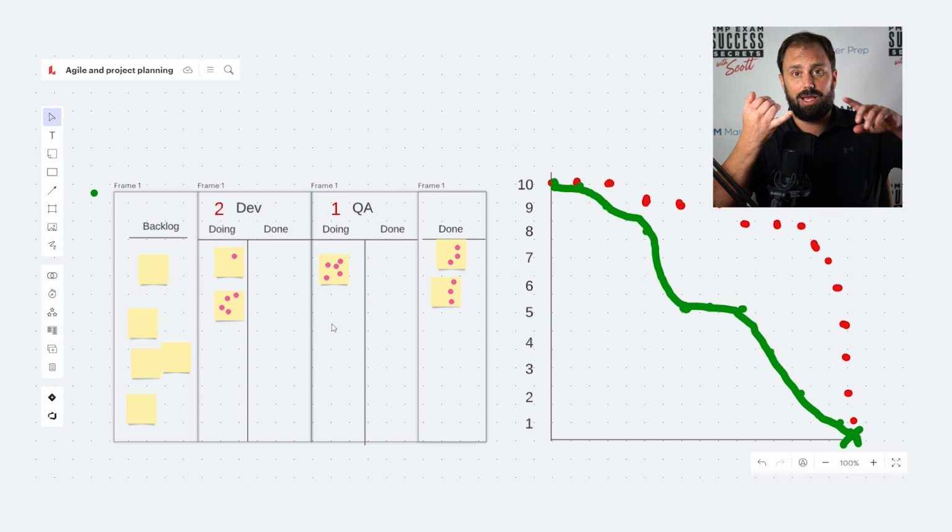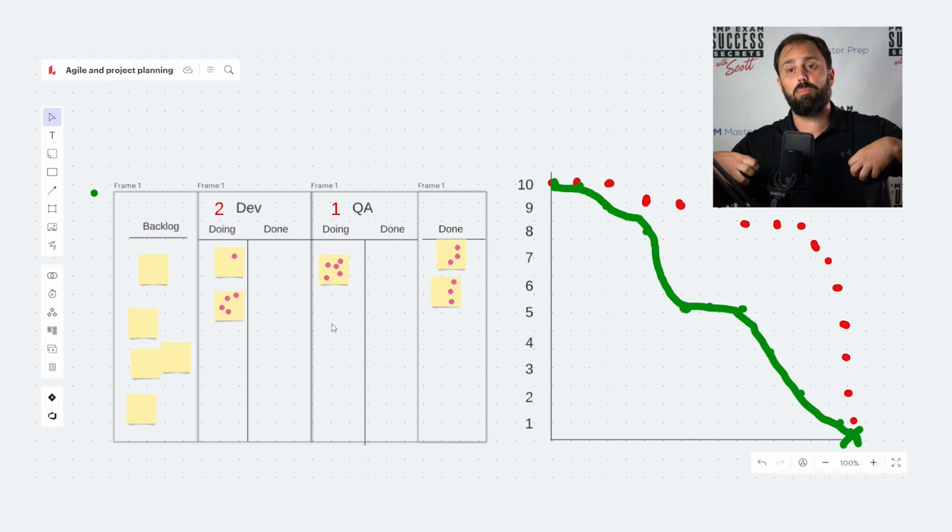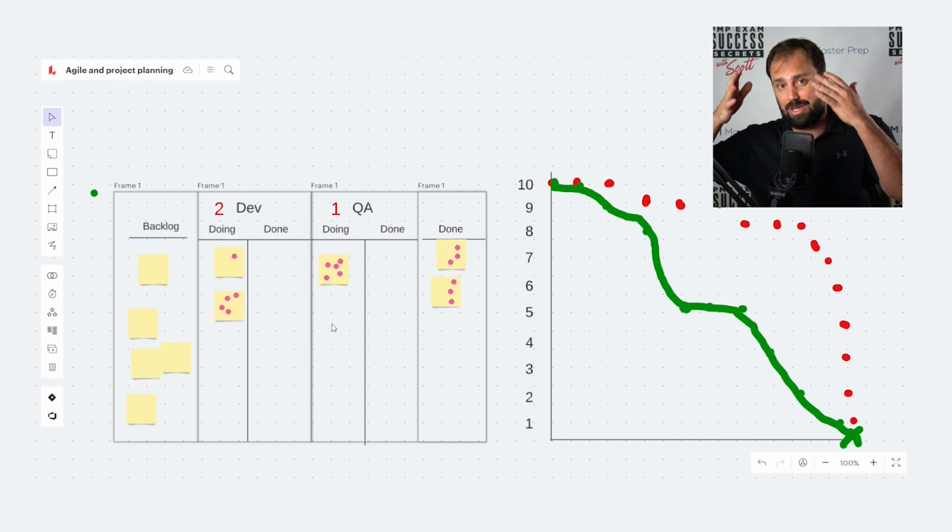So Kanban, what do we say? It creates a visual picture, helps us manage flow. You've got to have WIP limits. You've got to have doing and done categories. Inside there, you could have the blocked category that brings more visibility to it. You're just trying to get the conversation going. So that is just an extra lesson about how to think about this and why WIP and managing it is super duper important, because it helps focus us on the work that needs to be done.